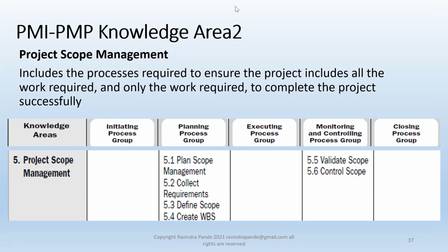Sure. That's very correct. If you can remember the box in the use case diagram, that's the scope we are talking about. The boundary line of what needs to be done, the total requirements which are approved and sanctioned for a given work. If you are developing an attendance management system, the leave management system does not come by default. If it's not approved by the client, then you might have to consider it as another project or an addition to your project. And that's fine, because these additions normally have some separate cost attached to them.